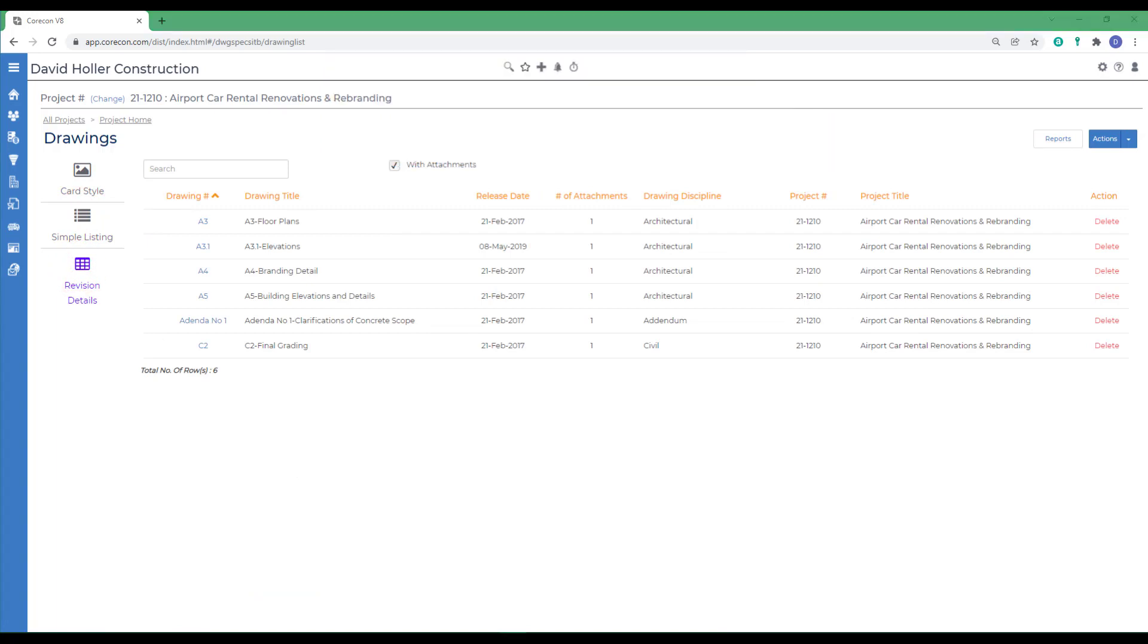At times, additional revisions to drawings occur. It might be because when you set up a project, you may start with a bid set or a permit set of drawings. Later, you'll receive a build set. It may also be that drawings are updated as part of an addendum or as a response to an RFI. Whichever is the case, we want to update drawing revisions and at the same time archive a copy of the original drawing that was uploaded. As part of the permanent record, but by having a more recent version would allow suppliers and subcontractors to see that most current revision only. That also saves on some confusion.